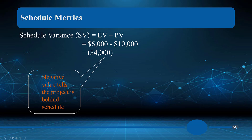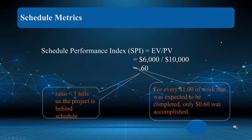Here's the problem with schedule variance: earned value is six thousand, planned value is ten thousand, so we're four thousand under. The issue is we could actually be six months late on the project yet end up saving money on tasks four and five, and thus come out equal even though we're six months behind schedule.